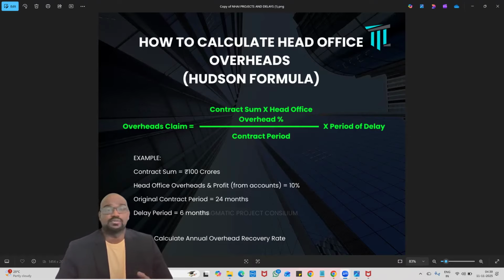But in certain situations, there is time but no cost, like force majeure and third-party delays, which are not in the control of both parties. In that case, both parties agree to an extension of time, but they don't have to compensate each other. The employer will not ask for LD, and the contractor will not ask for compensable or idle cost from the employer.